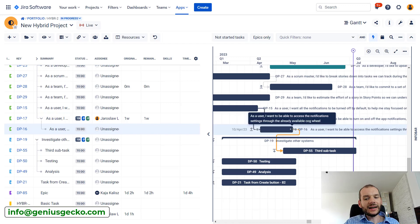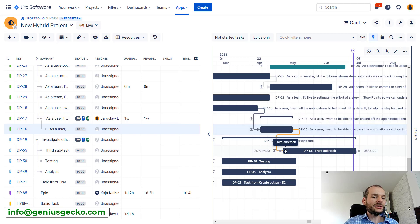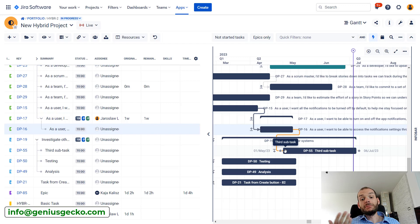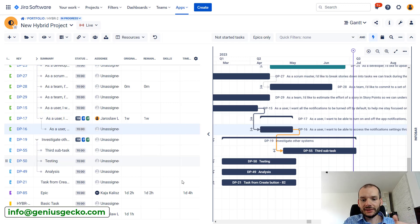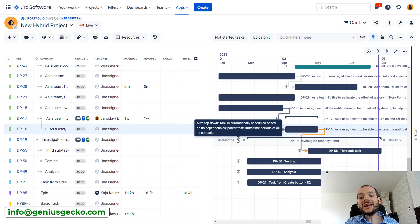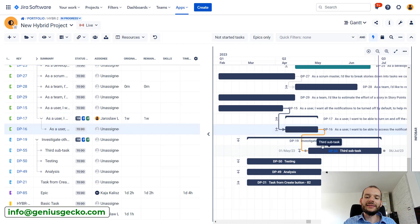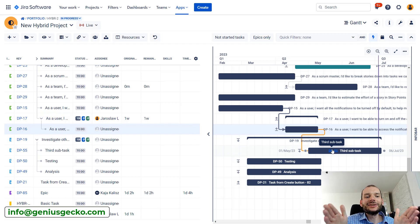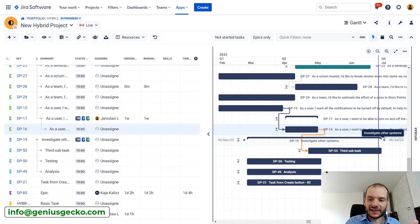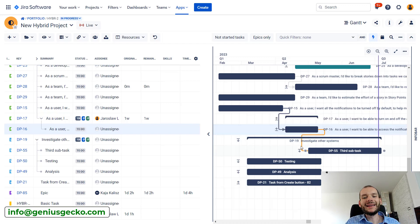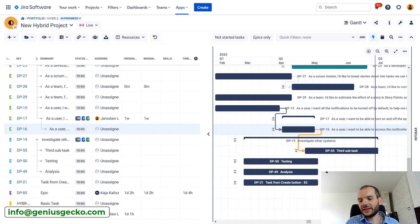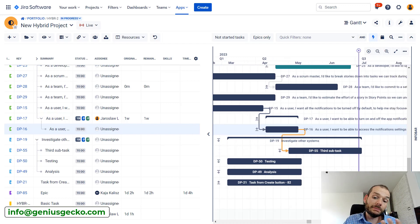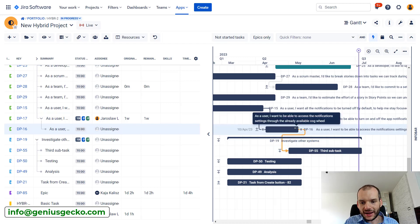Why? In that case, Big Picture tells us that this dependency cannot be respected. The end date of this task is later than the start date of the task that should be dependent on this one. Why is that? There might be multiple reasons. Maybe we locked this task so that nothing updates it. Big Picture does that too. In this case, we've changed the scheduling mode of tasks from auto bottom up, where the children task was determining the start and end date of the parent task, to auto top down, where the end date of the parent task limits where the child task can move.